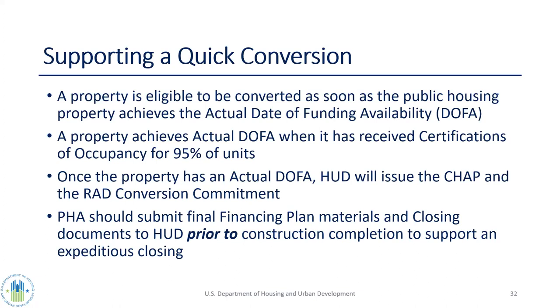If you are trying to convert as quickly as possible, you can make sure things are teed up actually before you hit DOFA. As construction is winding down, you can update any financing plan materials, right? If you need to modify some of your sources and uses to update closing transaction costs or something like that, you can do so there. You can also begin to prepare and upload closing documents, if you want, such that as soon as the property hits DOFA, we can get to conversion. We can actually convert it over to a Section 8 contract.